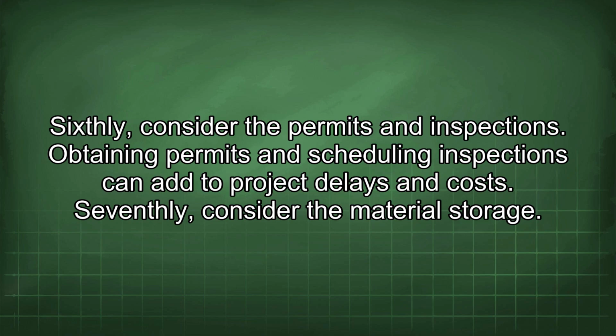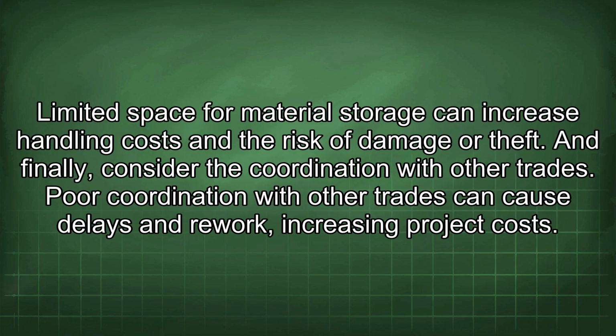Seventhly, consider the material storage. Limited space for material storage can increase handling costs and the risk of damage or theft. And finally, consider the coordination with other trades. Poor coordination with other trades can cause delays and rework, increasing project costs.